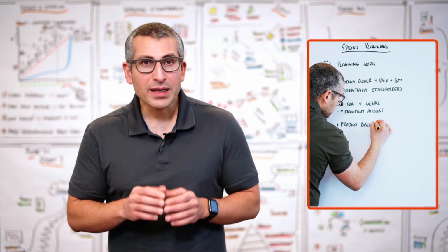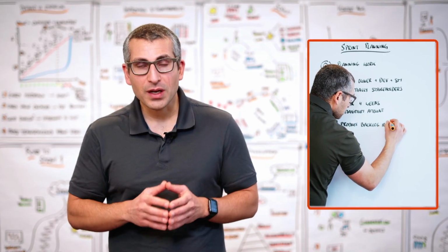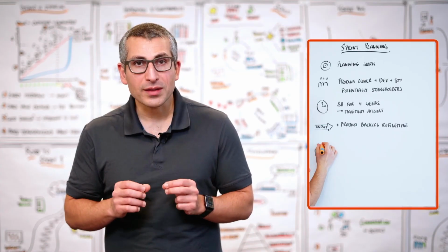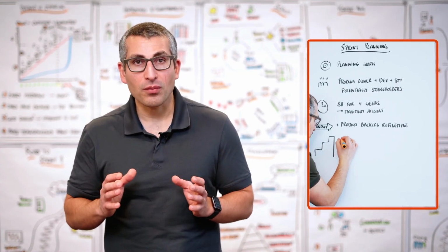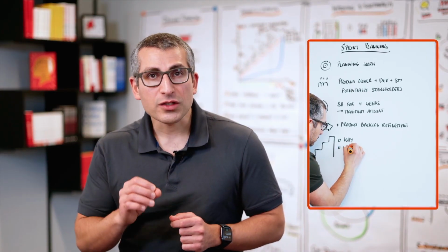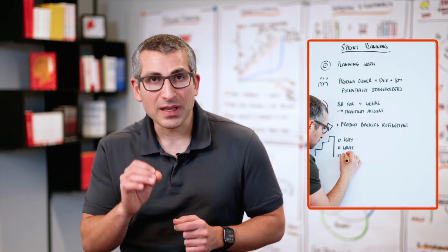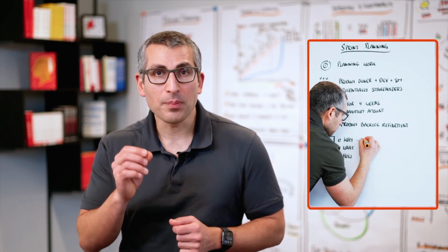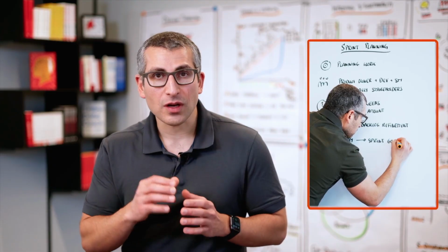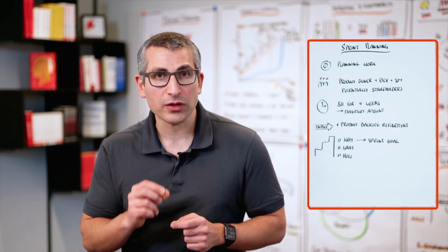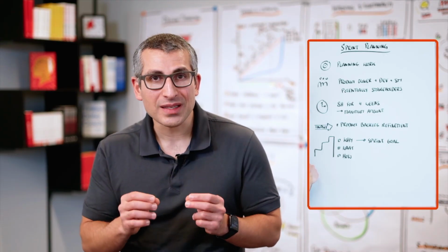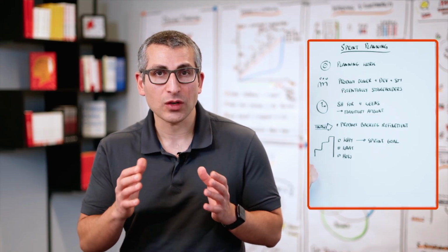The sprint planning is divided into 3 steps. The first step is all about the why, the second about the what, and the third about the how. The why of the sprint planning results in the sprint goal, which in the Scrum Guide is referred to as a commitment to one of the artifacts, being the sprint backlog. The why gives us the purpose of the sprint, the outcome that we want to achieve for our customers, not the output, which means not the number of items that we deliver.